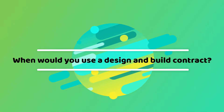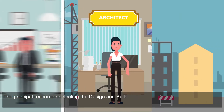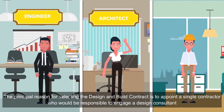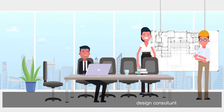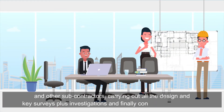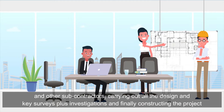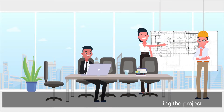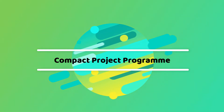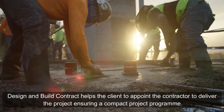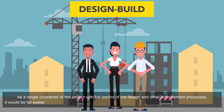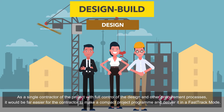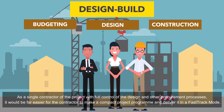When would you use a design and build contract? The principal reason for selecting the design and build contract is to appoint a single contractor who would be responsible to engage a design consultant and other subcontractors, carrying out all the design and key surveys plus investigations, and finally constructing the project. The design and build contract helps the client appoint the contractor to deliver the project, ensuring a compact project program, as a single contractor of the project with full control of the design and other procurement processes.